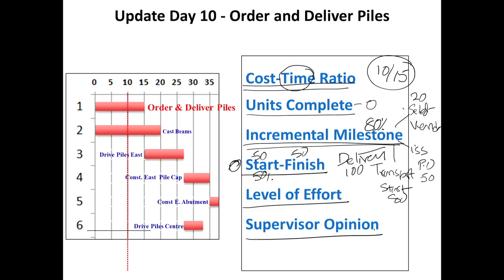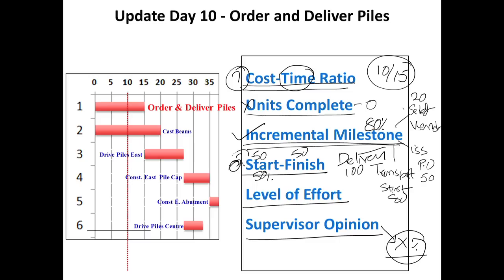Supervisor opinion can certainly apply to any of the activities. In this case you can ask the experienced supervisor what is the status of the pile order and delivery, and he or she can say it is X percent — for example, because I got assurance from the supplier that it will be here within a day or two. So if we look at this particular activity, units complete cannot give us a good answer; cost-time ratio also does not give a good answer. Incremental milestone is yes; start-finish might work; level of effort is too detailed for this activity. I would choose incremental milestone as the most appropriate way of finding percentage complete here.